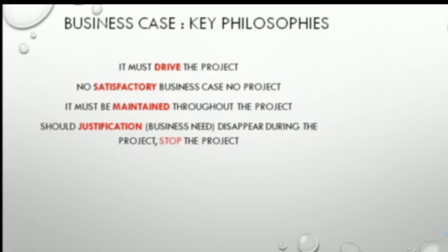Let's say, for instance, this fish business that you want to embark on, maybe during the course of the project, news now broke out that this coronavirus that is so dreaded is carried by fishes. Now, people will be scared of eating fish. You understand? And at that point, people will not buy the fish that you want to rear, which means the need for that business has disappeared. So at that point, that business should be terminated immediately.